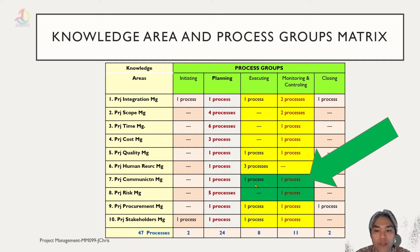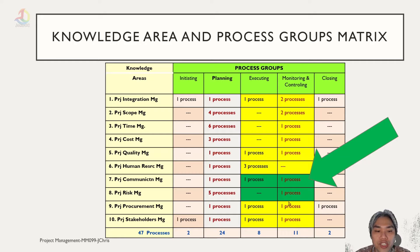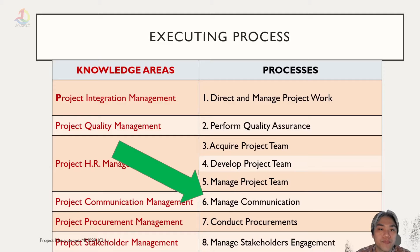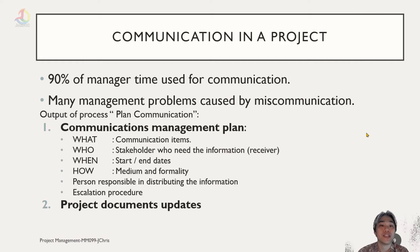Project communication management has one process in the monitoring and controlling process group, and project risk management also has one process in the monitoring and controlling process group. Let's start with the first: project communication management. The process itself is called Manage Communication. In the execution group, 90% of a manager's time is used for communication.